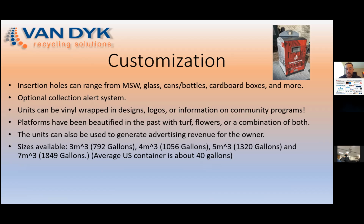Yeah, great question. So you can install 3 of these units in one day. When you order from Van Dyk, we deliver the containers and everything you need right to your doorstep. From there, you'd work with a local contractor. We would provide a project management supervisor to walk them through the process, make sure everything's done properly, and that would be it. So relatively quick to install.